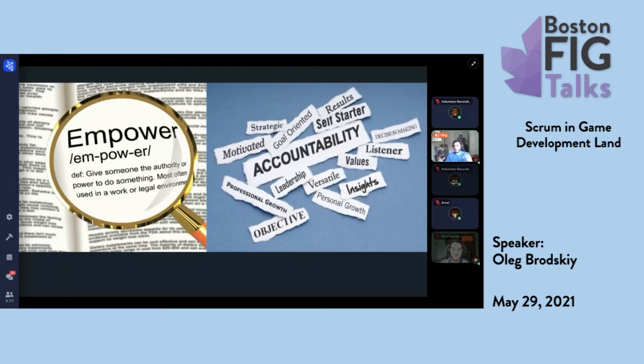That doesn't mean it's a zero-sum game where if the team doesn't give you everything, they failed. But it means that if the team is worried that they're not going to make the commitment that they have promised, they have to communicate with the Scrum Master and the product owner and say, hey, we thought we were going to do X, we can't do X because Y came up, or one of the things that we picked out is just much bigger than we realized, and so we need to have a conversation and reprioritize it and understand, is this still as important to the product owner as it was. Sometimes it will be, and sometimes that'll lead to bad sprints, but sometimes the product owner will say, yeah, that totally makes sense, we didn't consider that stuff because this is blown out in scope, we don't need this, it's not as important anymore, we can backlog that and come back to it later.